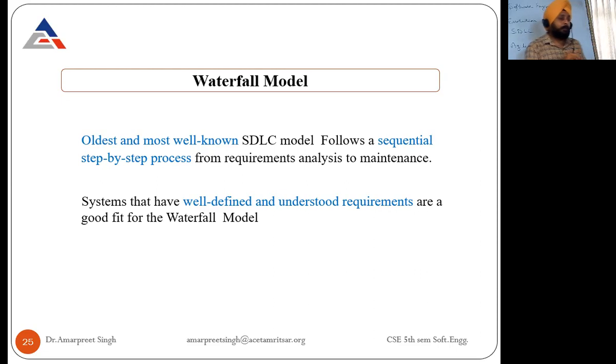Means the waterfall model is fit for those products whose requirements are very well defined and very well understood. Once the requirements are gathered, we feel that no more requirements are needed, no more changes are needed. So requirements are frozen. That analysis phase of requirements is frozen. Then we move to the design phase. So it is suited for those types of systems.